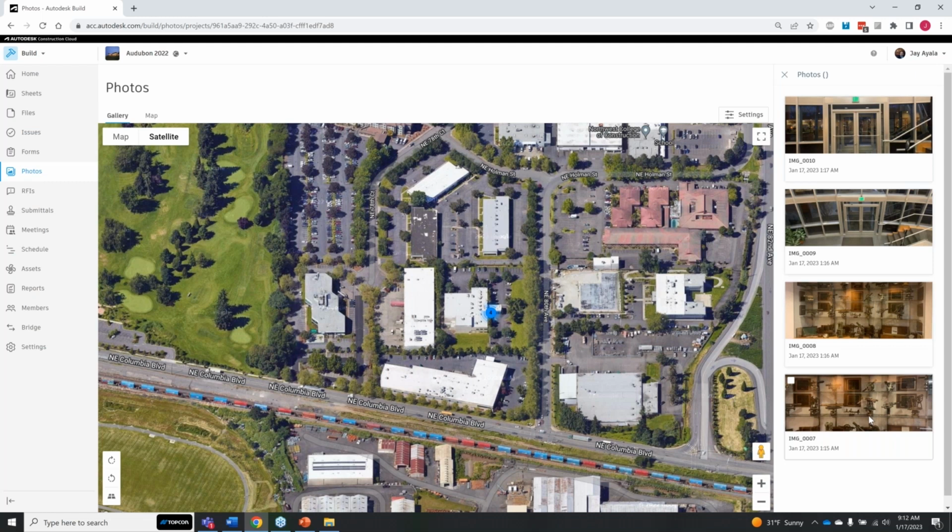There was a lot happening: earthwork first, in the first few photographs, and then the building was erected, and then it was skinned, and then it kind of looked the same without any changes towards the back half because all of the work was being done internally. But that was a super cool idea that he had, and that's what we're seeing, a big trend right now of those types of photographs.